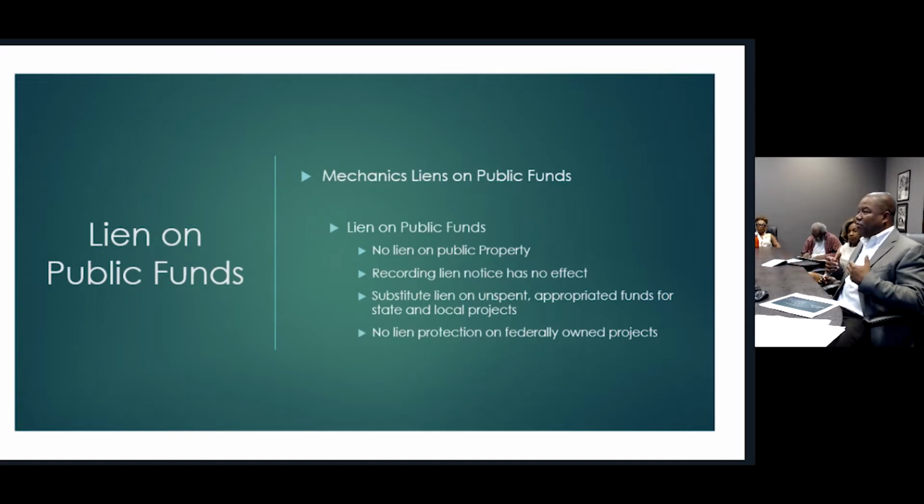So, well, how do I get all the money that's owed to me? Well, you're going to have to bring in your action for foreclosure, an action for a breach of contract, and if the prime contractor has actually been given funds by the government entity and they've spent those funds and that was your money, there's another action that you can bring for their breach of their fiduciary duty, their duty to pay you the money that you were owed. But those are separate actions outside of the mechanics lien. Okay, those are separate counts.